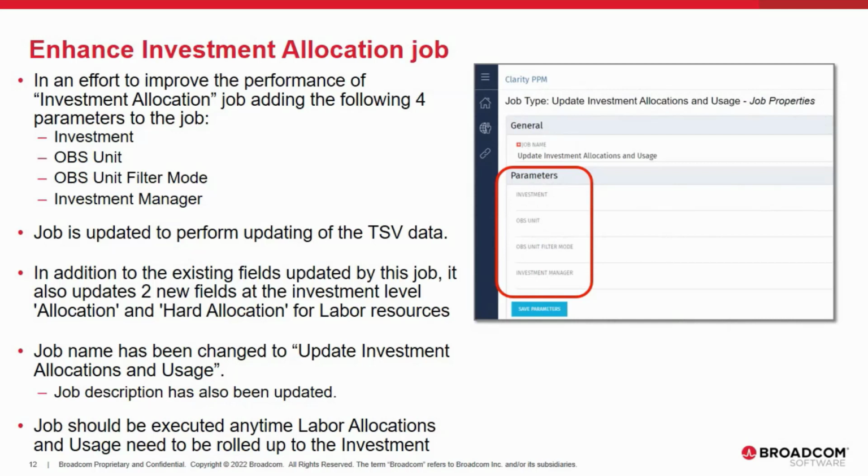Based on the customer request, we have now added 4 parameters to this job. These are the same standard parameters that are in other jobs that are available in Clarity. The parameters are investment, where you can pass an individual investment name, OBS unit, filter mode, or the investment manager.